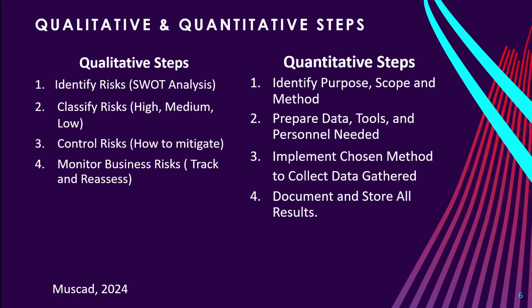The first step is to identify the risks, by brainstorming potential risks with team members and stakeholders using tools like checklists, interviews, and SWOT analysis to compile a comprehensive list. This collaborative approach ensures that diverse perspectives are considered for a more thorough risk assessment.